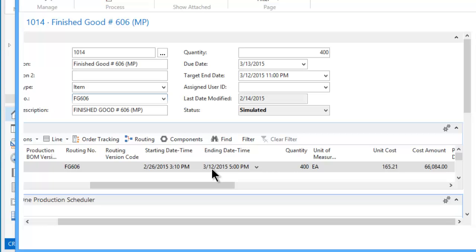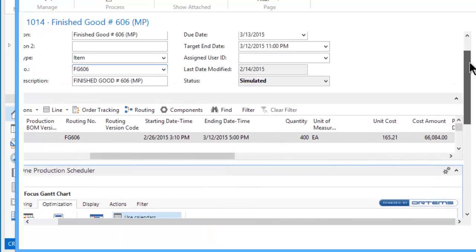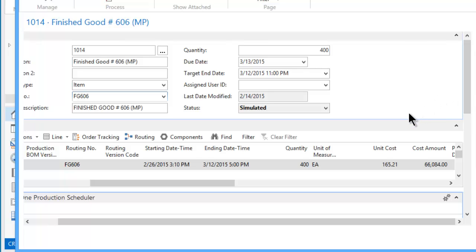So by using the scheduling engine, we can actually improve our delivery to the customer, and you can tell them right there, maybe you've got them on the phone. And you can say, well, it looks like based on the other work we've got out there in the shop, I can have that to you on about Tuesday the 2nd. Okay, and you can just announce that right then and feel very comfortable about it, whereas I get a little squeamish with these numbers that NAV provides simply because it is infinite scheduling.